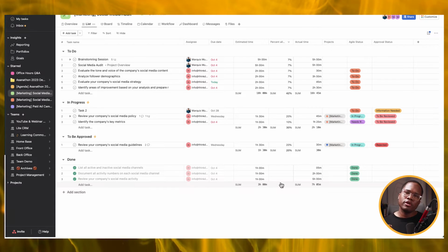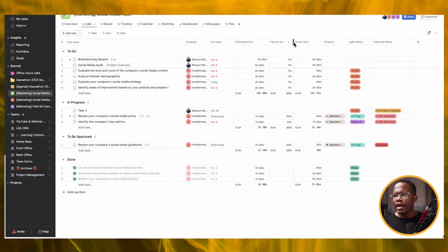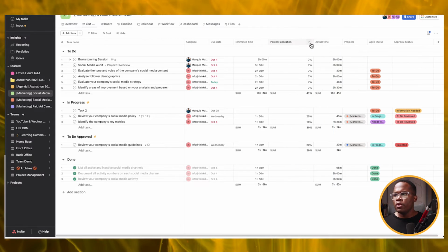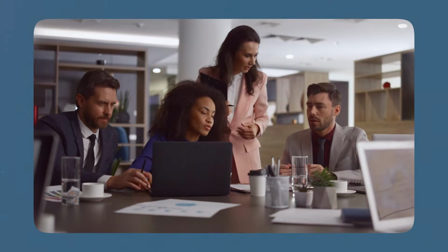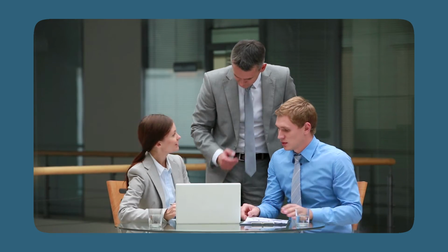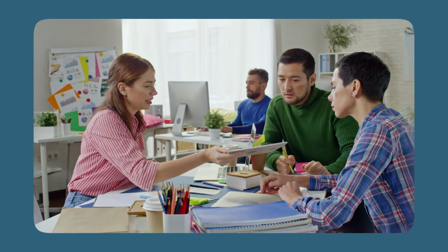I'm not sure how you're doing your project planning or who's filling out the allocation in these projects. Maybe you have a baseline for these projects already, and you're just inputting these based on historical figures. You can create recurring tasks weekly, maybe Friday afternoon, where you have to set all of your percentage allocation for the coming week. If you're doing Scrum, maybe that's just a required task in your planning sessions for your upcoming sprints. But if you did have these filled out, whether it's the product owner, project manager, or the team member filling these out, you have access to it.